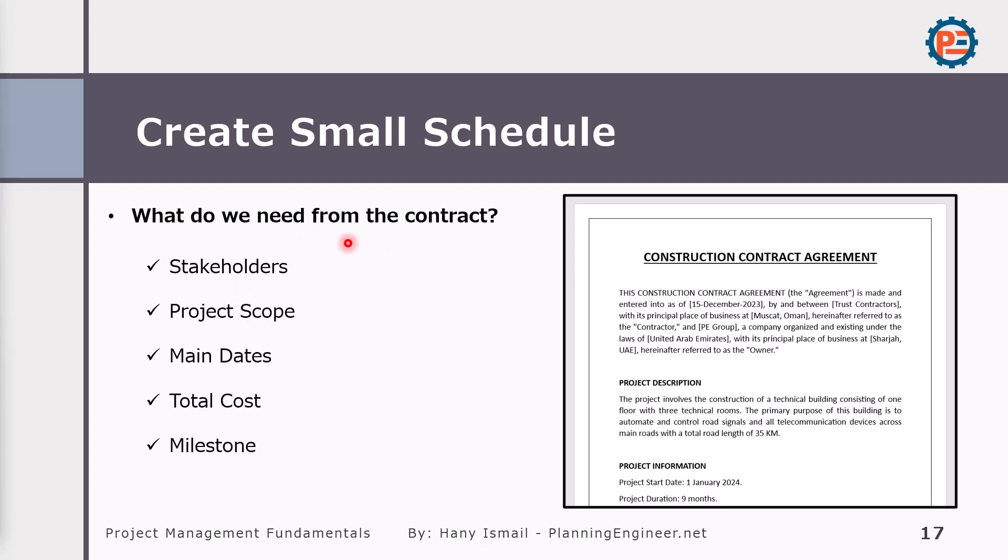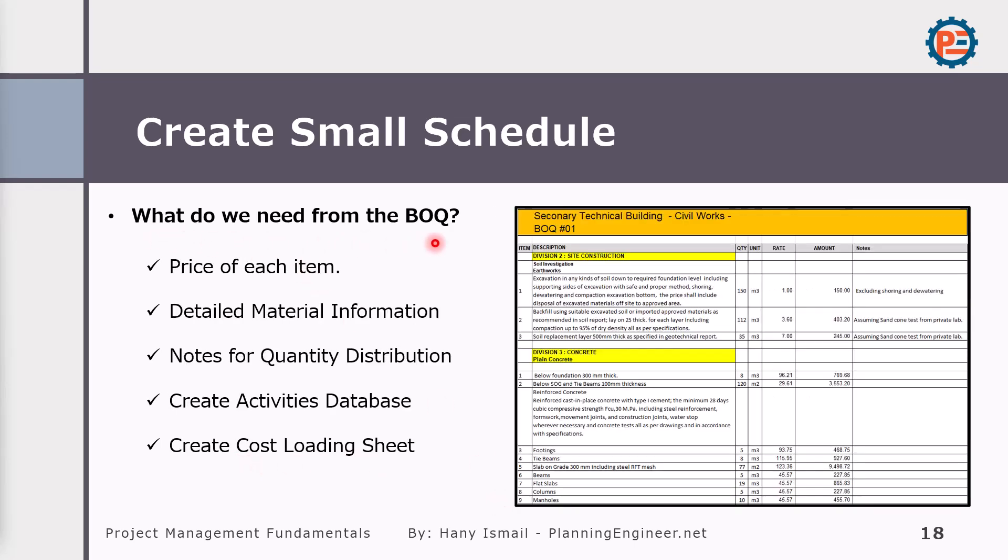What we need from the contract. In order to create a time schedule, you need to know who are the stakeholders. What is the project scope for? What are the main dates, total cost, milestones. Milestones here mean important dates like the project start date, finish date, if you have some intermediate dates. All of these you need to know before starting your time schedule. So what we need from the bill of quantity or BOQ. We need to know the price of each item, detailed material information, notes for quantity distribution. We can create the activity database and then create cost loading sheet. This is something very specific for plannings and we are not going to study in this course, but I'm giving you the overall picture so you know what is going on.